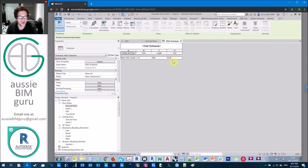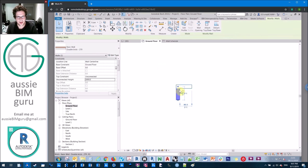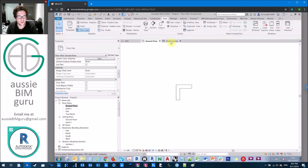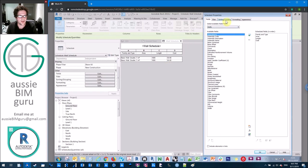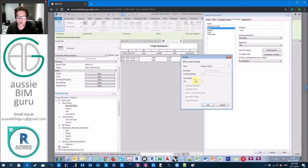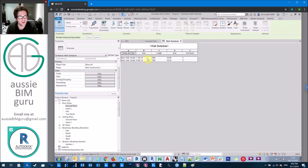Let's say this wall system costs $50 per square meter. Before doing more, I'll show what happens when you introduce another wall joined to it. I'll add a second wall and add a comment to each so you can identify which is which. Both walls are one meter long at their center. Looking at the schedule with three decimal places of precision, they have different areas: one is 1.135 square meters and one is 0.865 square meters. Together they combine to two square meters, but one wall has taken precedent over the other — quite surprising.